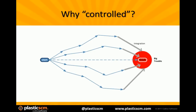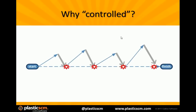The typical situation is when everything is almost finished and you just need to get all the code integrated — but then the integration process takes forever, causing a big delay on the project. That's basically what we try to avoid using Branch Per Task, and also what continuous integration tries to avoid. The rule of thumb is: when something hurts, try to do it more often until it doesn't hurt anymore. Instead of a single final big bang integration, try to integrate often. The more often you do it, the less likely it will become a delay.